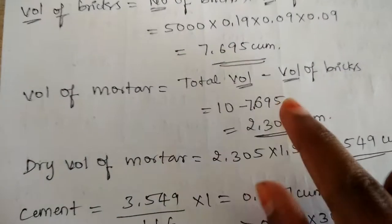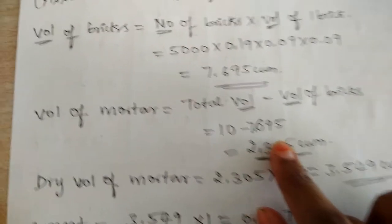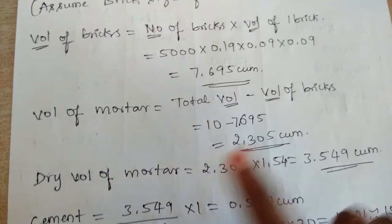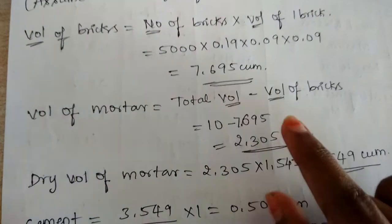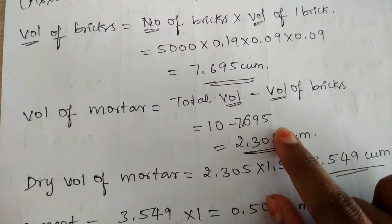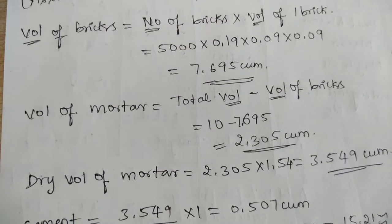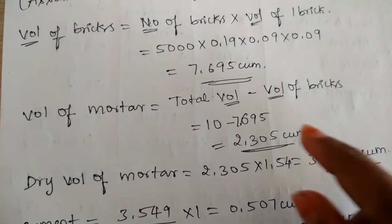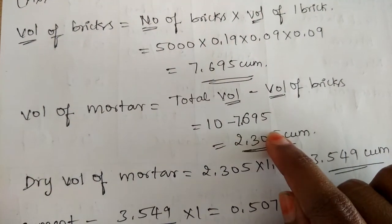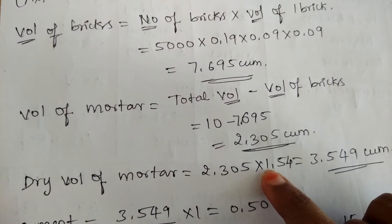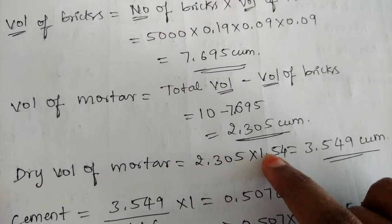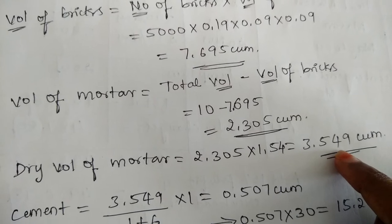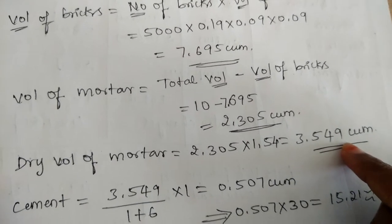This gives you the wet volume of mortar, but we need to find the dry volume. The dry volume will always be 1.54 times greater than the wet volume. So we multiply the wet volume with 1.54. On multiplying, we get 3.549 cubic meter, which is the dry volume of mortar.